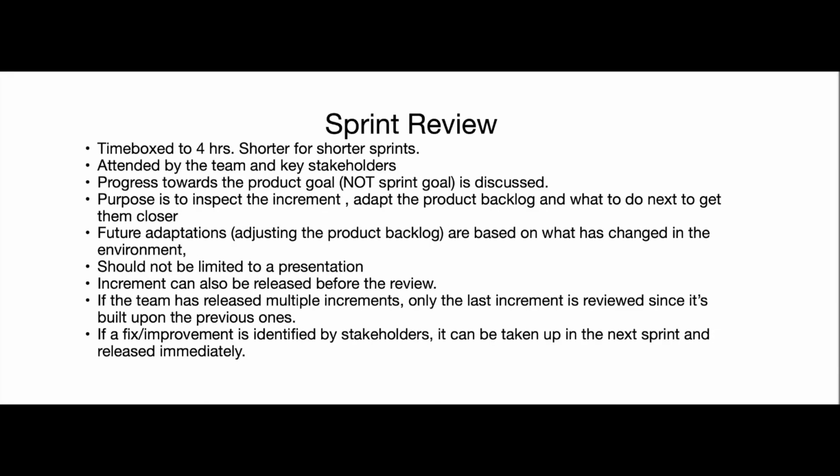Sprint review. It's time boxed to 4 hours. It's shorter for shorter sprints. It's attended by the team and key stakeholders. Progress towards a product goal, not the sprint goal, is discussed. Purpose is to inspect the increment, adapt the product backlog, and decide what to do next to get closer to the product goal. Future adaptations, that is, adjusting the product backlog, are based on what has changed in the environment.